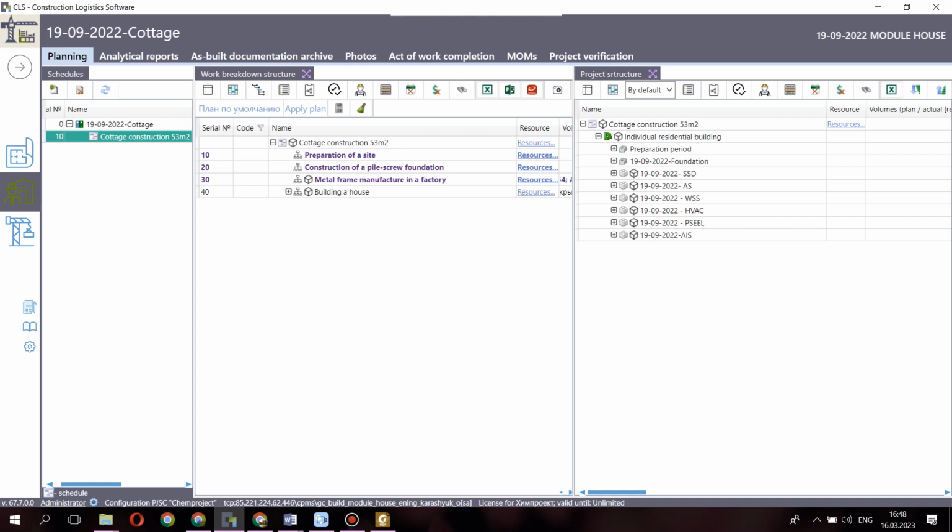Initial data used for planning. Planning is based on the application of the planning schema and information contained in the structure of the construction object, assignments. Scheduling schema, a work breakdown structure consisting of flows and divisions. A flow is a part of an object under construction, the construction of which is autonomous and technologically independent. Building and installation works flows are performed independently of each other.